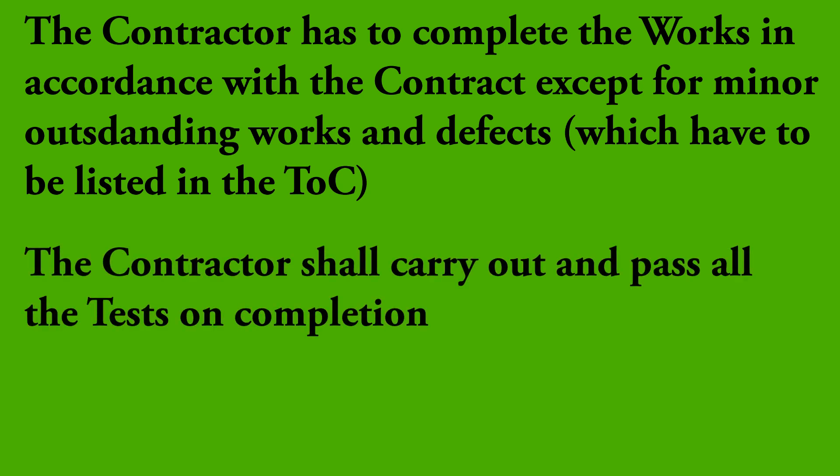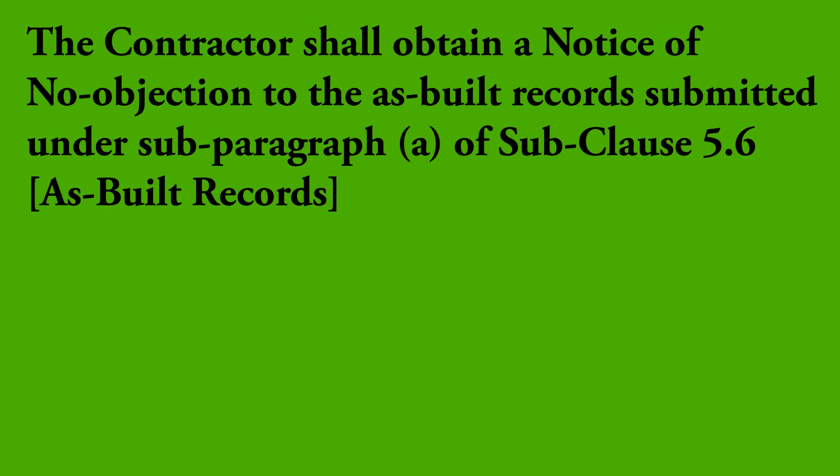The contractor shall carry out and pass all the tests on completion — and when I say contractor, this includes all sub-contractors, as the main contractor is responsible for them. Next, if the engineer has given or is deemed to have given a notice of no objection to the as-built records submitted under sub-paragraph A of sub-clause 5.6, As-Built Records, the as-built records for the works or section shall be submitted before the commencement of the tests on completion. These as-built records are not the final ones and must be updated for any changes occurring later, so the contractor must submit them and get no objection from the engineer before commencing tests.